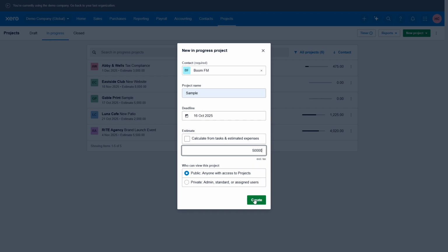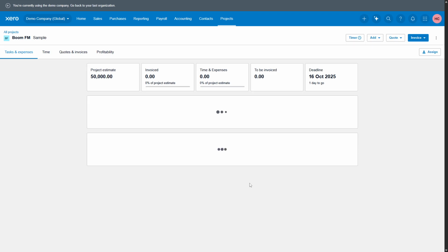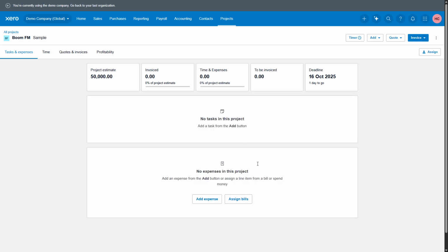To make the project more manageable, break it into smaller, digestible tasks. Assign each task to the relevant team members and estimate the time each will take, remembering to set a charge rate for their contributions. This task breakdown helps in maintaining focus and tracking progress at a granular level.